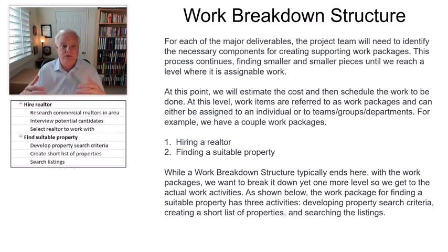Now, once we jump into that, for each of the major deliverables, you can see that the project team will need to identify the necessary components for creating and supporting those work packages. And you start to find smaller and smaller pieces until you reach the work level where work is assignable, where you can actually put someone's name down on it. So you can see that in the image off to the side, hire a realtor. These 3 tasks, researching commercial realtors in the area, interviewing potential candidates, and selecting a realtor to work with, are all subtasks of hire a realtor.